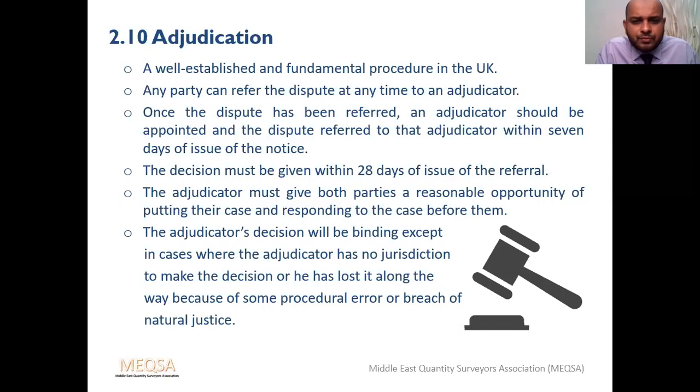And time bars are there. Okay, it's mentioned here as well. Any party can refer the dispute at any time to the adjudicator. Even if you are within the contract and you agree, the same procedure will be followed. Once a dispute has been referred to the adjudicator, he should be appointed and the dispute referred to the adjudicator within 7 days of issue of the notice. These are the procedures mentioned in the UK construction contract. This is not very important in terms of adjudication. The decision is to be given within 28 days. This is also a part of the UK's law.